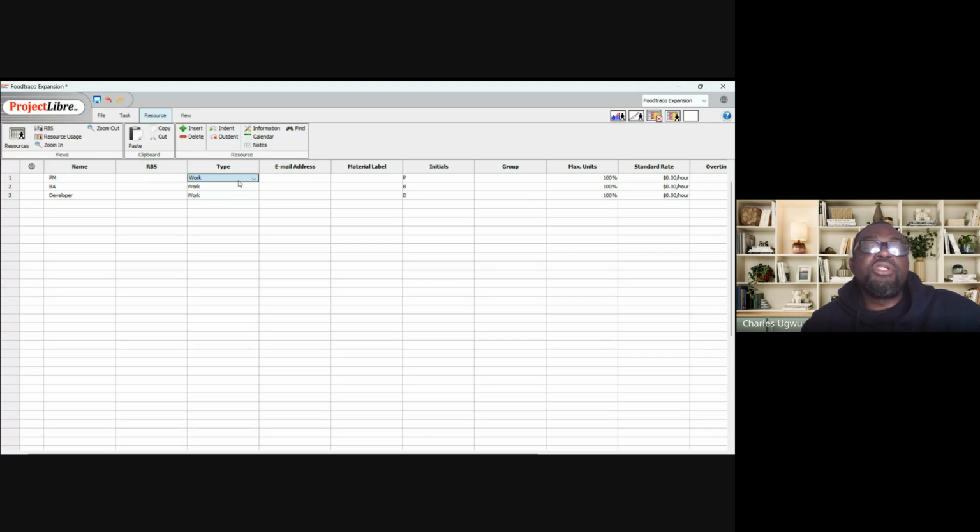Work resources and not material resources. We have work or material. Like if we now want to capture, say, a bag of cement, it can become material. Or a trip of sand, it can become material. But what we are working on is just work resources, that is human resources.